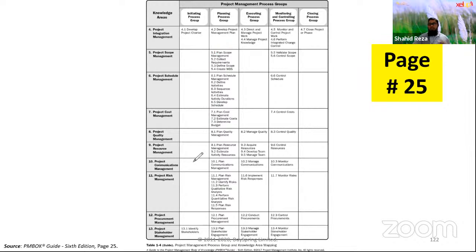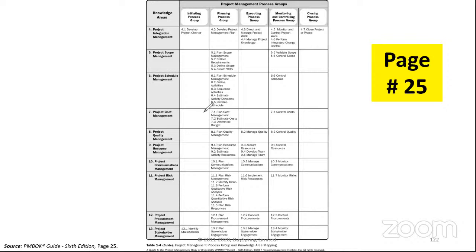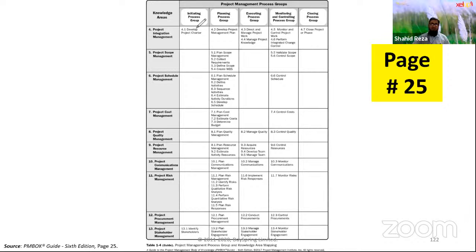All right. So first thing, what we have learned, generally, I am saying, not everywhere that is actually correct. So generally, in initiation, you have to do these two processes, planning these 24, execution 10, monitoring and controlling 12 and closing 1. And the sequence, I am saying vertically, but it doesn't mean you have to do it sequentially. There is no mention of sequence. What sequence you will do the processes in is not mentioned in PMBOK. You have to identify that by yourself, by your team, using your expert judgment. So that sequencing is not discussed in PMBOK. I am talking about a general sequence.